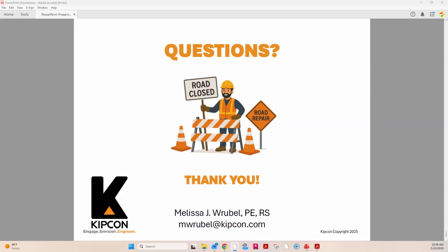Before we go to bid, we will give our bid list to the owner, so the board can review that. We allow them to remove any contractors they don't want on there. They can also add contractors, and as I mentioned before, there may be contractors that I have not worked with in the past, but I don't just go on the internet and find contractors in my area. If they come recommended from somebody, they will go on the bid list. But other than that, we maintain our own bid lists.